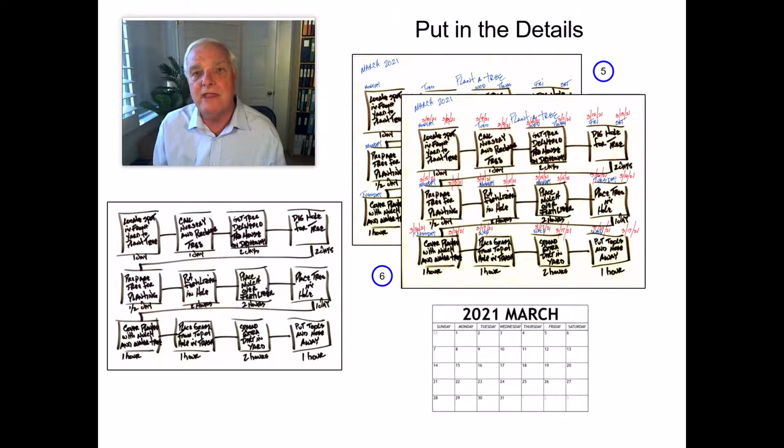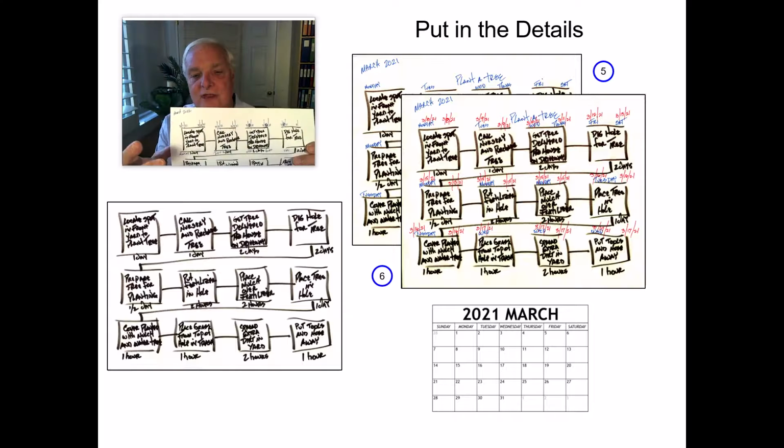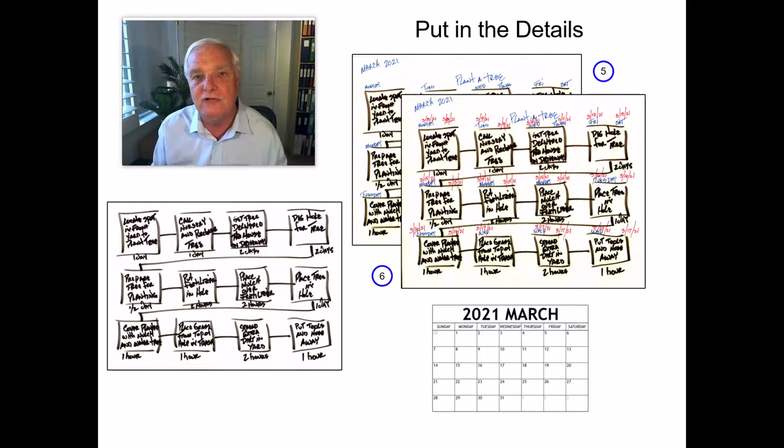We're grabbing our calendar and we pick a day to start with, and you can see that the first day that we picked is a 1 day duration. So it starts on this first day and it ends on that same day, and you repeat that logic all the way across. That gives you the ability to identify what we call the baseline start and the baseline finish days across the top as illustrated here. Once you're done with that, theoretically, you understand how long the project takes and what it looks like.